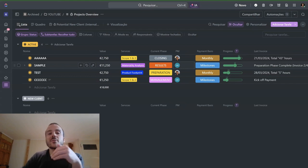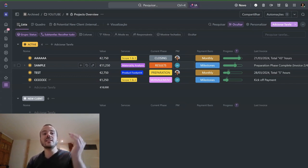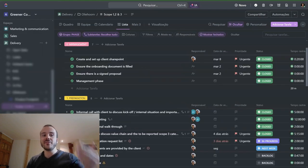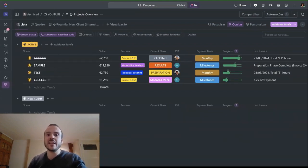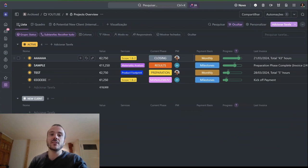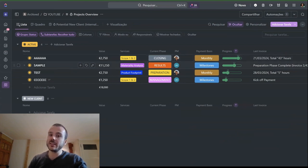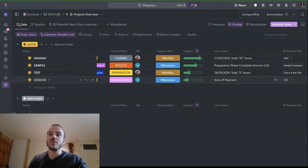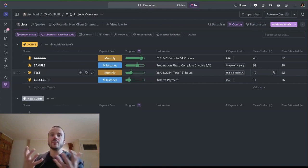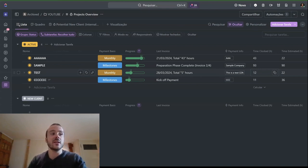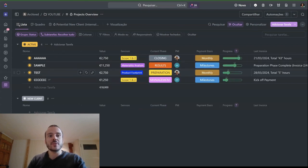This is very important. I have a daily automation — because ClickUp doesn't allow it natively — so I built an automation on Make that basically reads the delivery space, every folder, every active client, daily. It reads and updates a few different things: the current phase, the progress, and the total time tracked for that specific project.